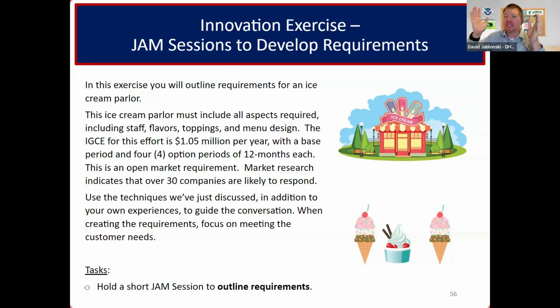That way in phase one, it's going to be light, maybe like 5 pages. We've seen 5 pages as a prior experience, and then 5 pages of pictures, even 10 pages total. Or maybe you evaluate 7, 10 vendors. We've seen up to 100 vendors in the first phase. And then you go to a smaller subset of vendors where you ask for more difficult information, like an oral presentation. What's their technical approach? What's their management approach? Give us any staffing plans that you have.